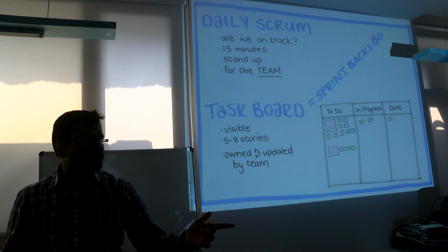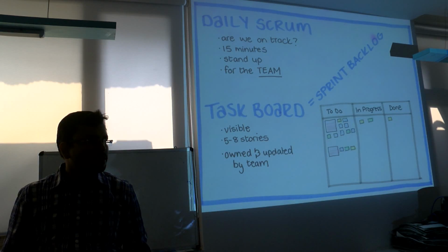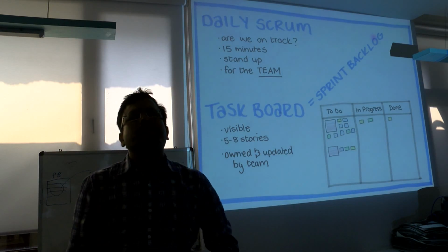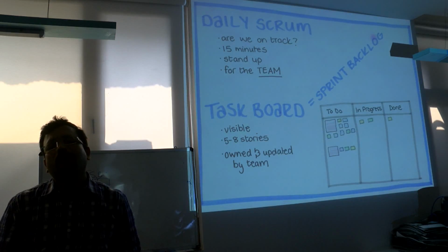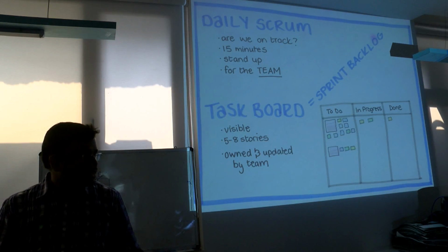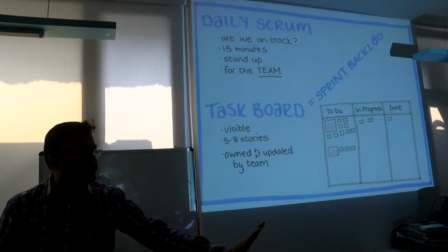Yogesh, question? At what point of time is the time frame decided? The time frame is that in 10 days, 1 day is sprint planning and 1 day is retrospective and review, so in 8 days about 5 to 6 days is development. You have to do it within that. If a particular story has 7 story points or 8 story points, how do we decide the time frame? Where was it written that 8 story points will take 8 days? Story points do not mean days, they are complexity, a type of complexity.